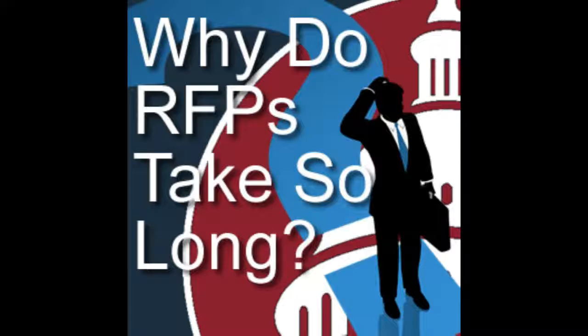Again, we'll circle back to complexity there. A simple requirement like an ATV, with lots of suppliers, might take you more time to figure out which suppliers can actually meet your needs. A complex requirement with very few suppliers, like a satellite, still might take a long time to get out because of the dollar value and the sheer volume of different sub-requirements underneath the main requirement, which is to share communications via satellite. So the industry capabilities by themselves interact with the other factors. Exactly.